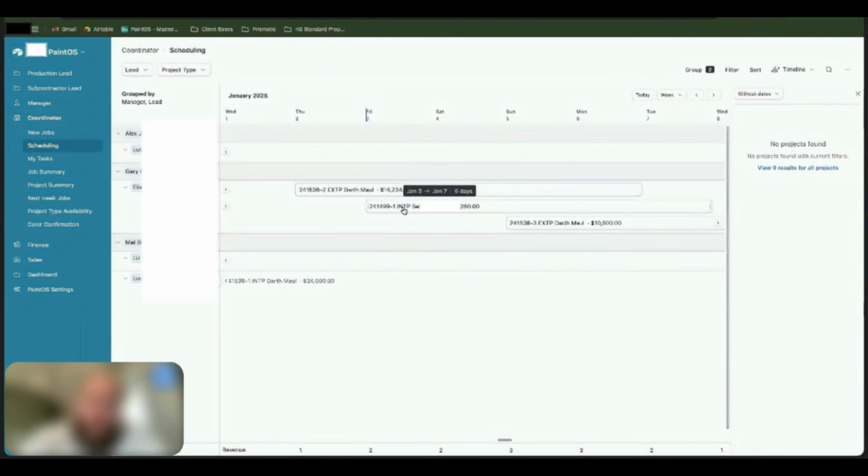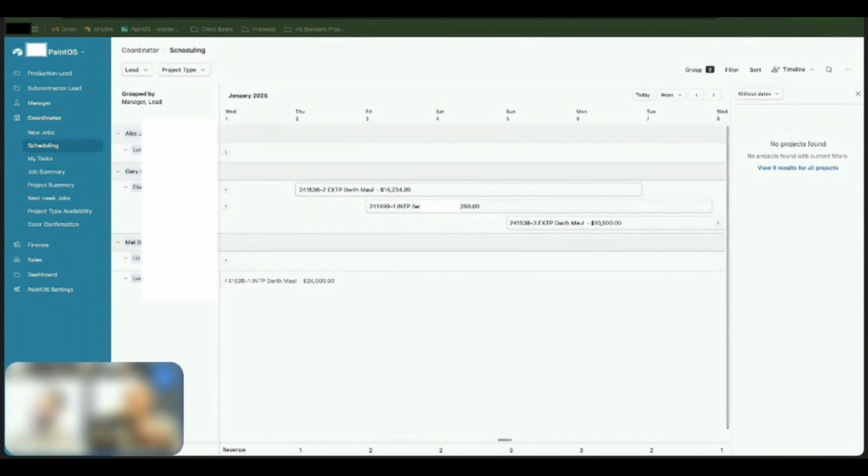So if I'm understanding, his timeline won't be as accurate, because if I have, say, a 40-hour project, a 32-hour project, and a 16-hour project starting on one day, it's going to show that with his capacity he could get each one of those projects done in a day, but we might have one member on one project, 2 on another, 3 on another. Yeah. So Matt, I put Nate's capacity at 16 hours a day, as a guess, because 2 people. But if he puts 4 people on it and D scheduled it for what she thinks is going to be 3 days, it's up to you or Nate to know it's only going to be a day, and then I need another job moved up for the next one.